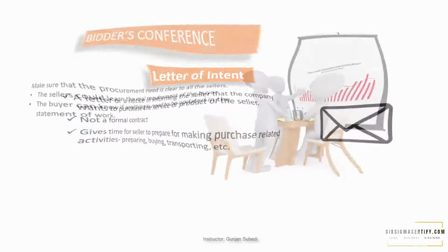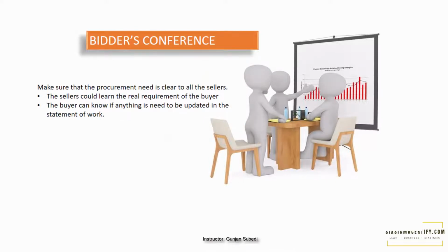Let's learn about another term, bidder conference. It is all about making a meeting or conference where every seller is made sure of the requirements of the buyer and the contract type. This is for making sure that all the sellers have the same information about the service or product being sourced for or being asked by the buyer.